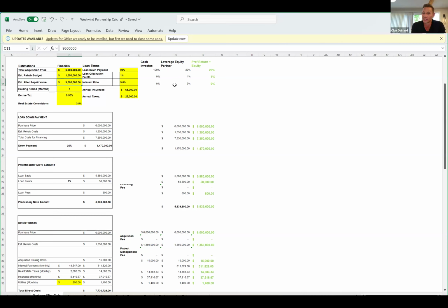After going through it with them, I'm going to save about $150,000 on the construction. And the house is going to get done roughly 2 months earlier. Now, the cost to hold this deal is roughly $45,000 a month. So that's $90,000 in interest and $150,000 in cost savings. So that's 250 grand. Now, when we were looking at the pro forma, though, it said 1.1. So I'm now giving up 600 grand to save 250. That doesn't sound like the math makes a whole lot of sense that way.